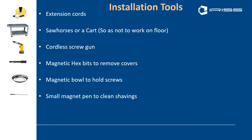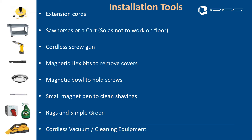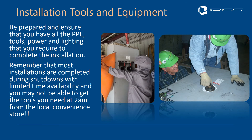Use collar screw guns, magnetic hexagon bits to remove covers, and small or large magnets for cleaning up metal shavings — you do not want metal shavings in or around the panel. We tend to remove panels and go to what we call a dirty area outside the switch room for all cutting and grinding, then return to keep the room clean. Use rags, Simple Green, and vacuum cleaners or cleaning equipment. Remember, while you're shut down, your maintenance should be done. Also — if you need one drill bit, take six; if you need one grinding wheel, take six. This time is precious.